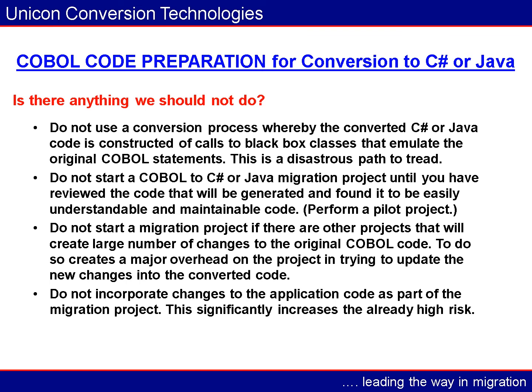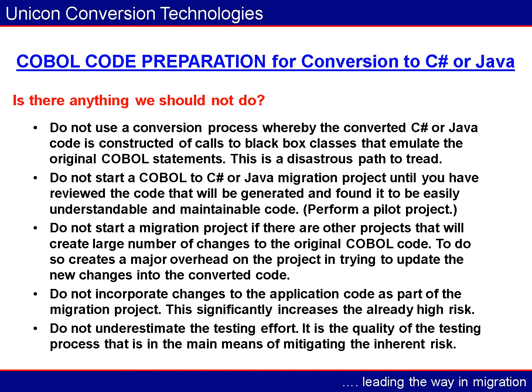Do not plan to incorporate changes to the application code as part of the main migration project. This significantly increases the already high risk. Do not underestimate the testing effort. It is the quality of the testing process that is the main means of mitigating the inherent risk.